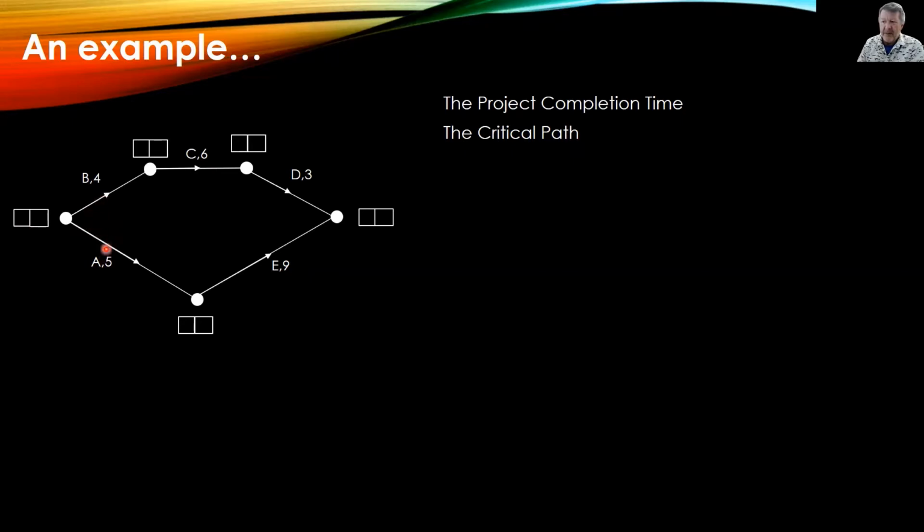Arrows both come out of here, and both go into here. So start, finish. I'm not labeling on this one. All right, so we start with 0. We're going to go up the way. B takes 4 hours, let's say, doesn't have a unit on this one, so we'll put a 4 up there. C takes 6 on top of that, so 4 plus 6 is 10.